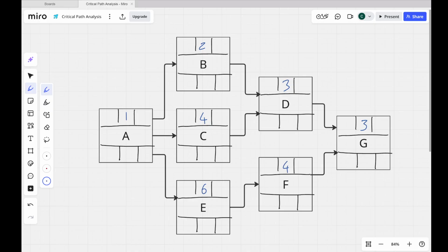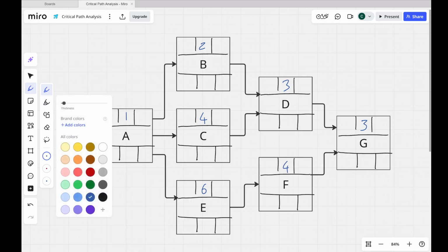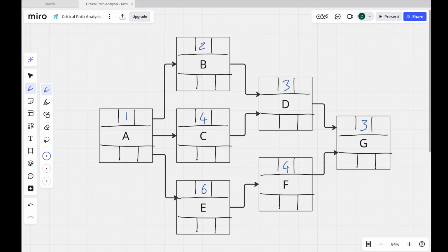So this is the critical path bit, this is the maths now, okay? With this network, we have an order. So we're starting on the left. Typically on a Gantt chart we work left to right, and with this we work left to right. So the first task in the whole project is going to be task A, based on the logic we talked about in the last video. We're not worried about dates, what date the start of the project is, or what date we need to finish in. We're not worried about any of that.